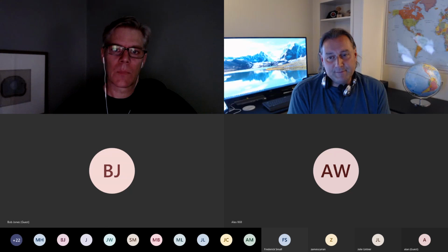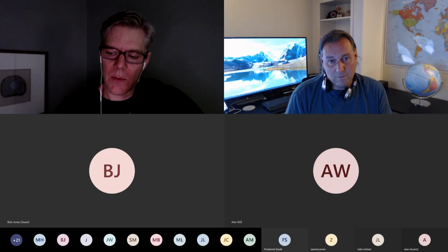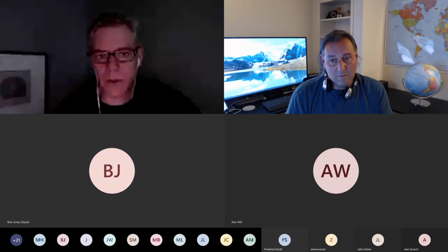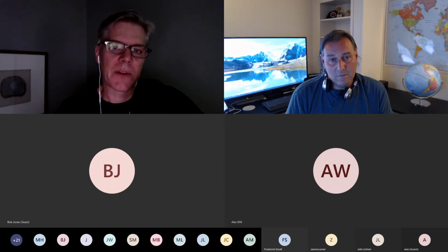When is it done? Right. So I would say, well, we could talk about that, but I don't want to tie the final payment to sign off, because that's going to put pressure on both of us to sign off too soon before it may really be done. So if you sign off and then it turns out in 3 months there's some quarterly report that doesn't run the way we expected, well, you're going to have to pay me again to come back and fix it.